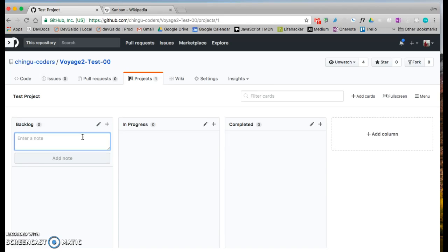Now what I've done is created a markdown template. What I like to do is format my cards as what are called user stories. User stories take the format of: as a particular role, a particular type of user or participant in a project, there's something that I want to do, and there's a value statement. If I do this, what does it enable me to do? The other thing that I add to this is who this task is assigned to. Initially it's to be determined, typically.